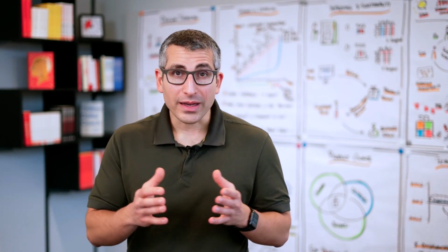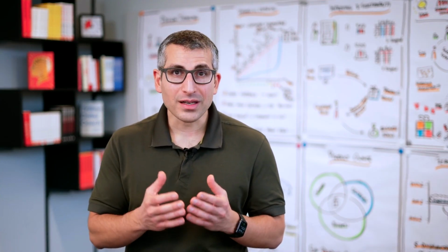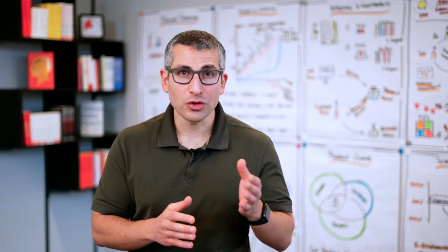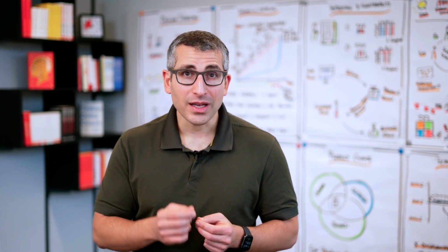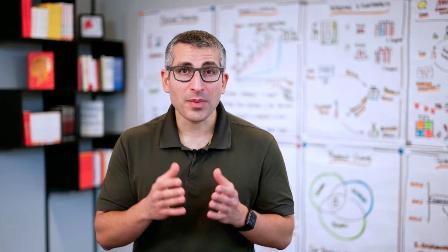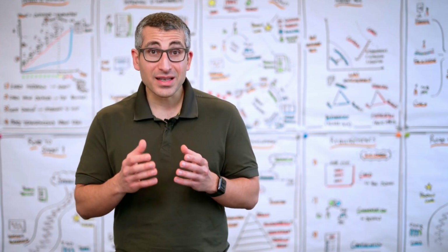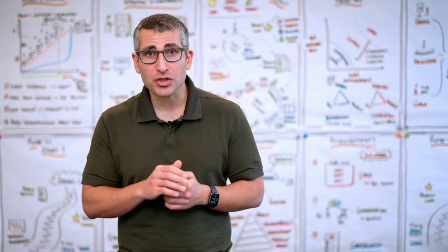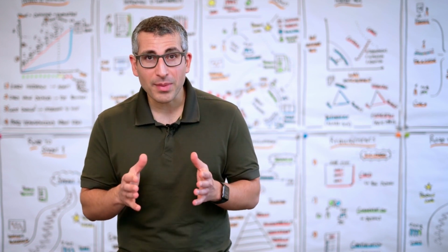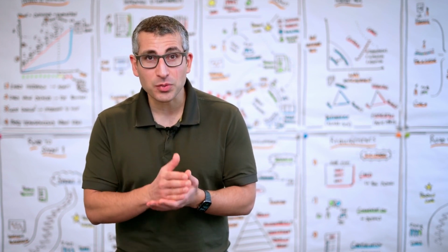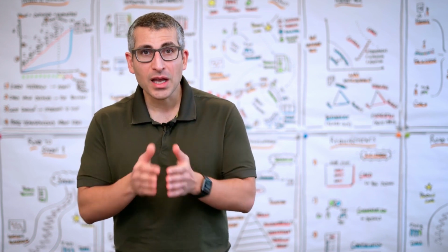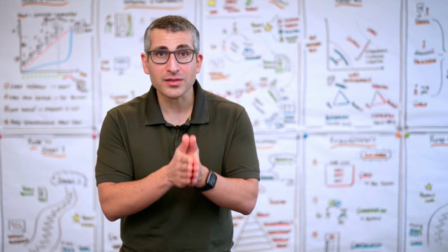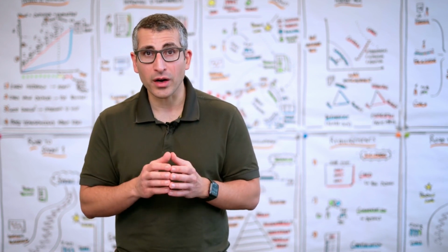So you know already how Kanban works. You basically visualize your workflow: to do, in progress, and done. You limit work in progress, and ultimately, you optimize flow through the system. So if you have a team of, let's say, 6 team members, and you want to ensure that each of those team members is being as productive as possible, this usually goes hand in hand with focusing on as few things as possible, ideally one.